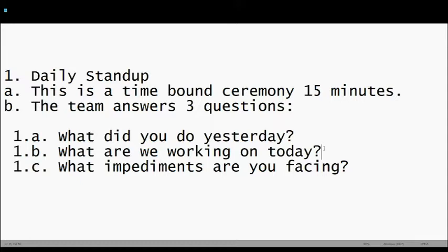We need more clarity. Okay, so let's discuss this after the stand up. Let's put it in the parking lot. And right there, you will take down a note as a scrum master on the side: dependency faced by person Seema. She's facing a dependency. Let's discuss this in depth after the stand up. After that, we will move on.